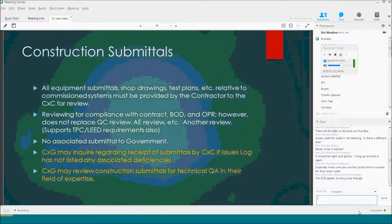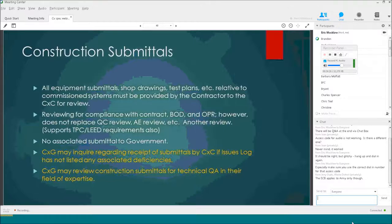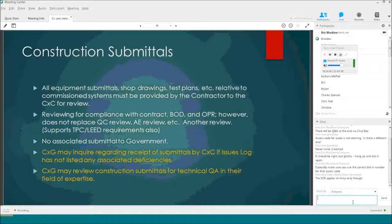For construction submittals, all equipment submittals, shop drawings, and test plans related to commissioned systems have to be provided to the contractor's commissioning specialist. They review for compliance with the contract, the basis of design, and owner's project requirements. This does not replace the quality control staff review or an AE review. The government specialist may check on the contractor's commissioning specialist to make sure they're getting the submittals they're supposed to be getting. If there are any deficiencies listed, those should be showing up in the issues log. You could also have the government specialist review the submittals for technical issues.